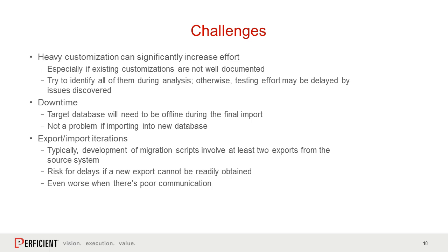Hard to emphasize that enough, especially because you don't have access typically to the source system, and there's going to be some turnaround time for the previous vendor, for the owner of the source data, to get you what you need. And if you're in the middle of validation, it's going to cause delays, and it's not going to look good. So you covered that during the development phase, and through a couple dry runs, you ensured that we're pretty confident that once we go into the official validation, we'll have everything we need.